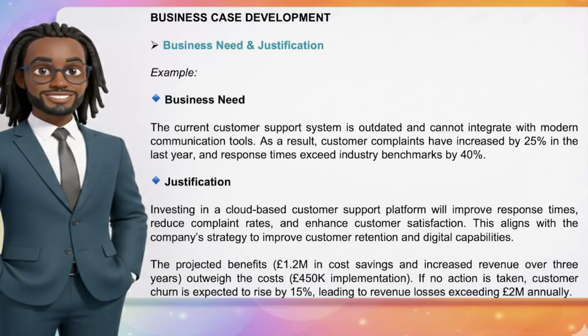So a good example for business need would be: the current customer support system is outdated and cannot integrate with modern tools, leading to a 25% increase in complaints and 40% slower response time. An example for justification would be: investing in a cloud-based platform will improve response time and customer satisfaction, aligning with our strategy. Benefits outweigh cost, and inaction could lead to 15% higher churn and over 2 million in annual revenue losses.